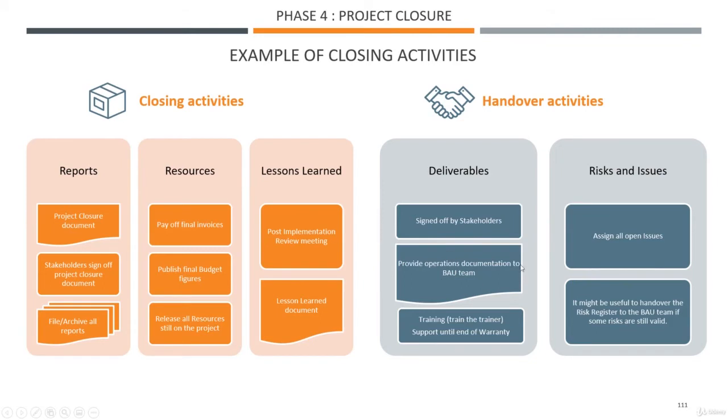Operations documentation to the business as usual team. Say you build a bridge, you have all the knowledge, so you need to give all the operations documentation to the team who will be maintaining this bridge. Website, the same thing, software, the same thing.